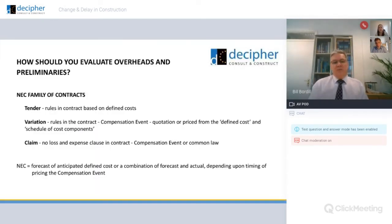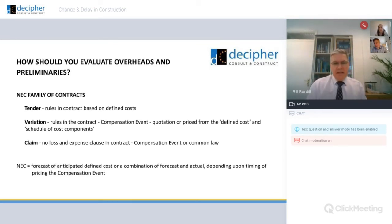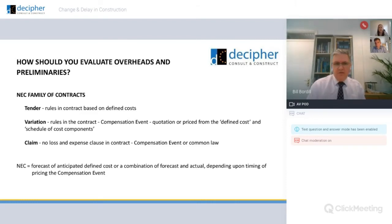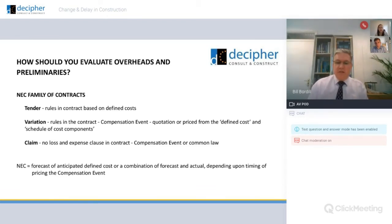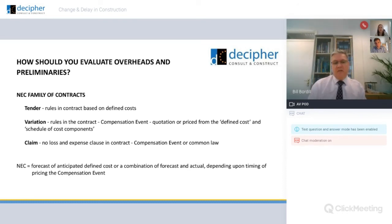The NEC is a very prescriptive contract. It tells you how to put your tender together and how to price variations — now known as compensation events — which is a combination of your defined costs from your schedule of cost components and your fee percentages. Bear in mind there is no loss and expense provision within the NEC, so everything has to be caught within a compensation event, which can be time-barred. It's very prospective and very prescriptive.